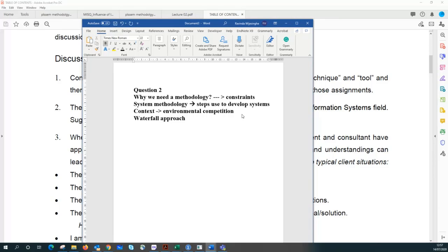if you know the product we are developing. The classic example is the enrollment problem. Student enrollment: we know exactly what the parameters are that impact that project, what the other variables are that impact it, all right? The environment is pretty much constant, so we can see the product we are going to produce. In that kind of context, we can use the waterfall approach step by step. We can plan it, we can properly forecast the financial impact of that project, etc. Then it's easy, right?